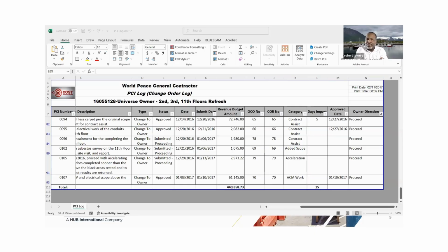So D, certified payroll is not included, because your certified payroll for the ones that do prevailing wage is what's going to the Department of Industrial Relations, or if you're in a union, your payroll doesn't have to be included. That's what you're paying your guys. So certified payroll is not included, but everything else is. And that's what creates your packet. All right, thank you for that.